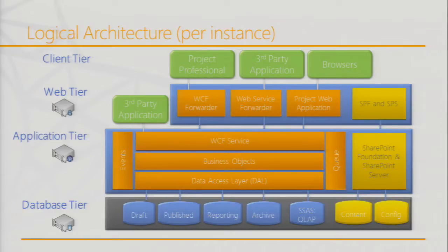So we actually have a dedicated relational database that we call the reporting database, not terribly creative, where we funnel all the data. And Archive is just a database you use if you're done with a project. Let's say it was a 3-year replatforming, Windows 7 rollout. You're done, you want to archive it. You don't want to completely delete the data, but you want to offload the production database.